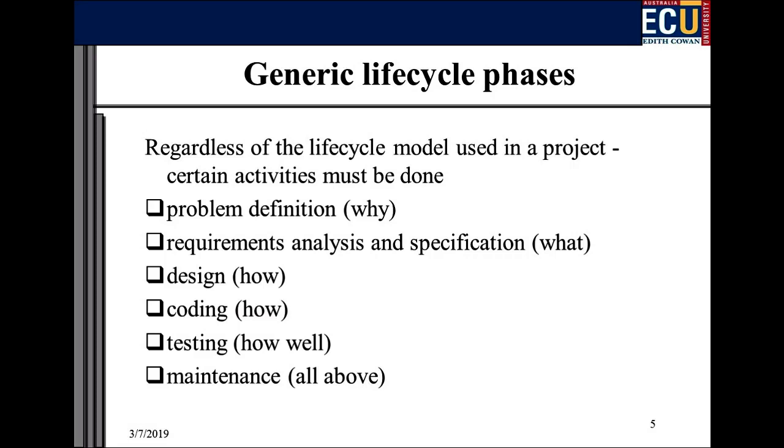But actually in software, that's how it works most of the time. The requirements, the specifications you start off with might not actually be what you implement at the end. Right? No, I mean, there's different names for it, but it's actually an accepted part of the software industry, and partly it's because of us, right? Partly it's because we're not experts in the domain. Versus someone that's had a degree in something and 20 years of experience, in healthcare, for example, versus us reading briefly into it, we're going to make mistakes, right?